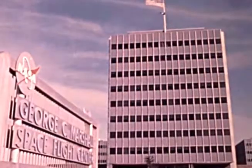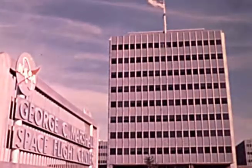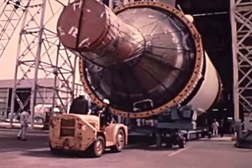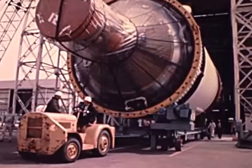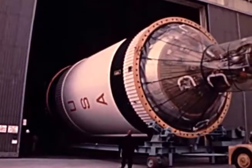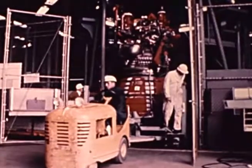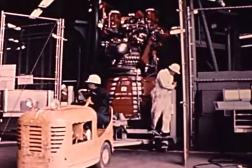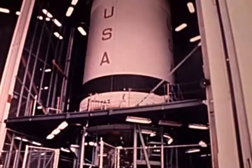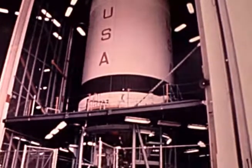At the Marshall Space Flight Center, the Apollo Applications Program continued to move into the hardware manufacture and test phase. At McDonnell Douglas, the Saturn 1B second stage to be used for the orbital workshop was moved from storage and placed in the vehicle and assembly building. During April and May, the J2 engine, aft and forward skirts, and thrust structures were removed and all exterior paint stripped from the stage. Engineering design of all modifications is nearing completion, and fabrication is well underway. Installation of the workshop floor and wall-attached studs has been started.